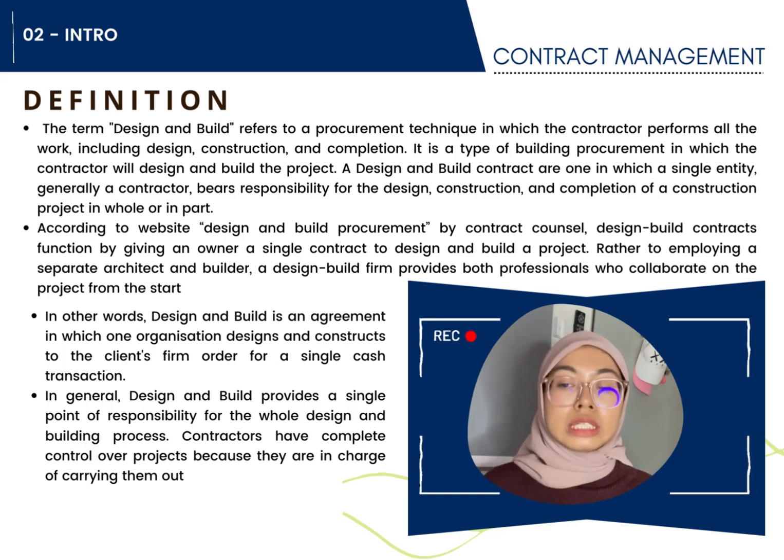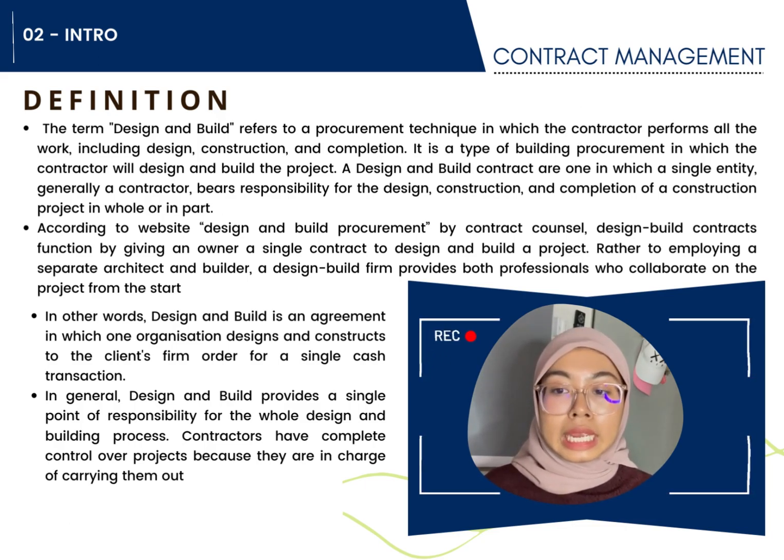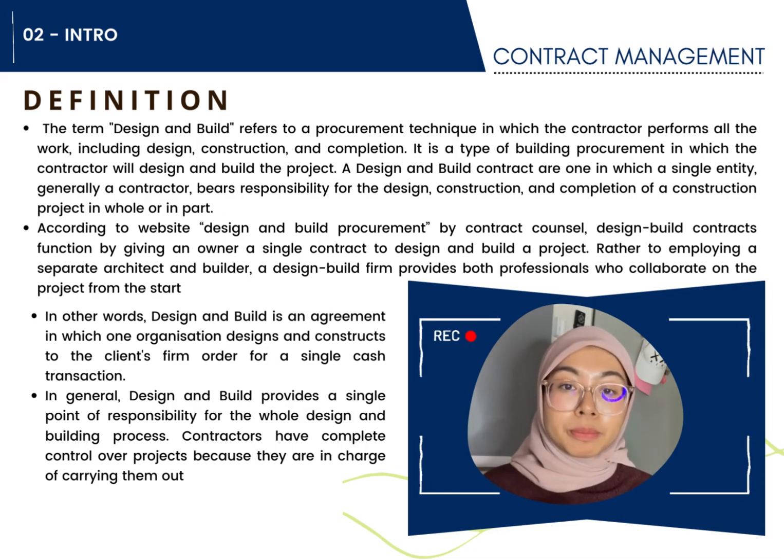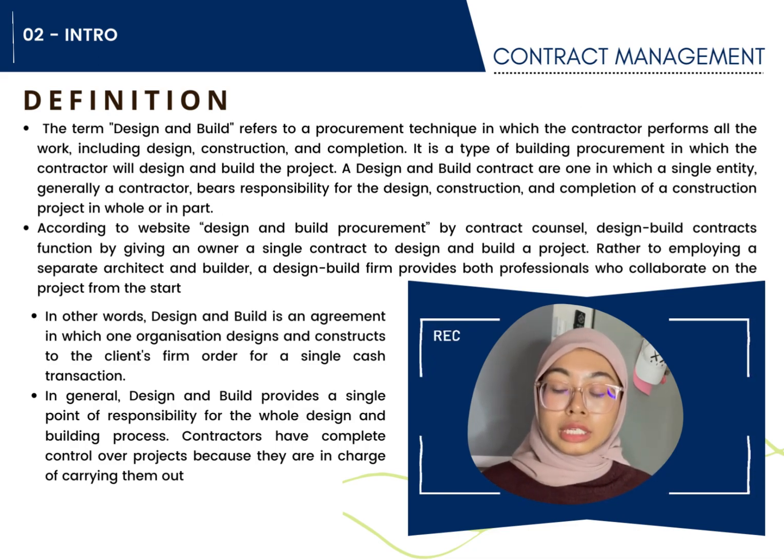In other words, design and build is an agreement in which one organization designs and constructs for the client firm under a single transaction. Design and build is defined as the process in which the client deals directly with the contractor for the entire building, and it is the contractor who is not only responsible but also coordinates the separate design and construction process, including the engagement of the design team, who are thus contractually linked with the contractor and not the client.